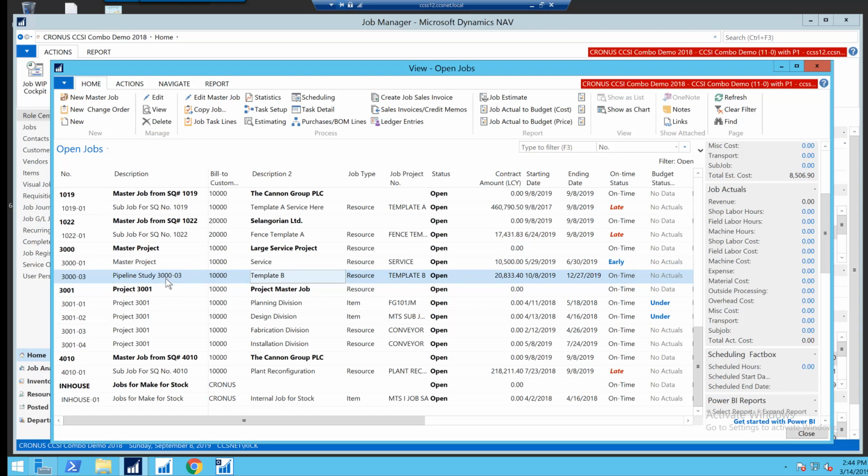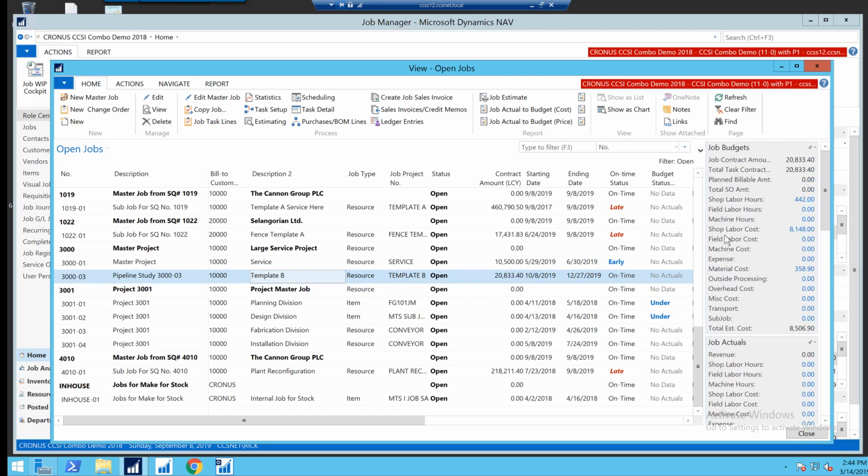But do remember, if the scheduler says that activity is going to take longer, then the cost is going to go up. So where we had the budgeted cost, not the actuals, the hours may increase as well as the labor cost, because the scheduler overrides what the estimator initially thought of. Think of it this way.